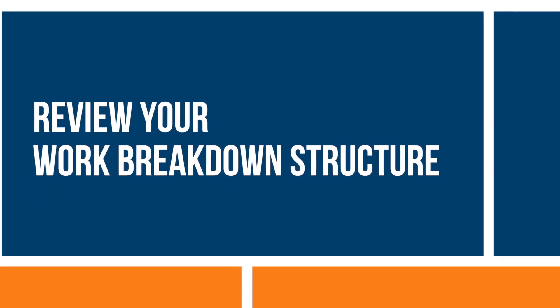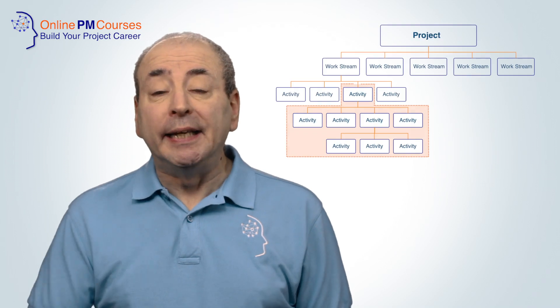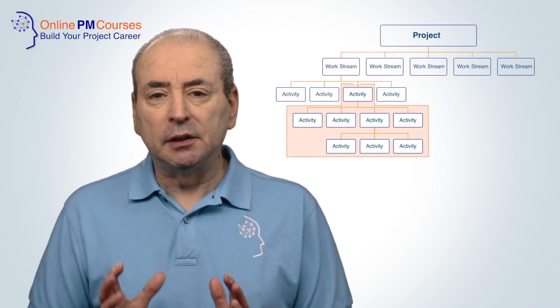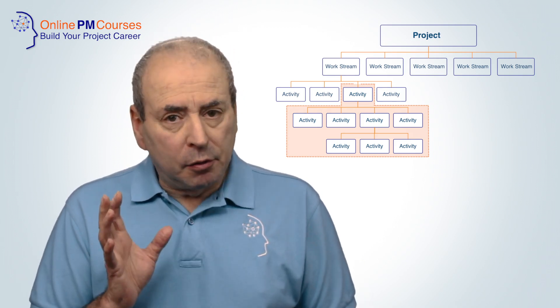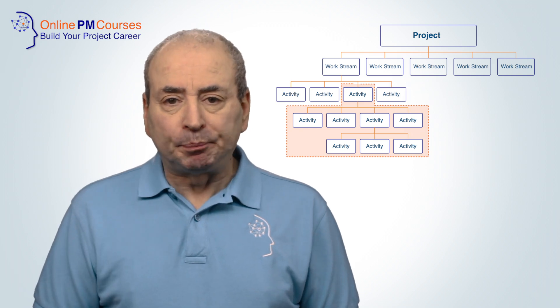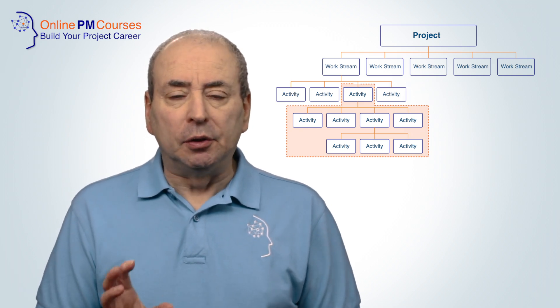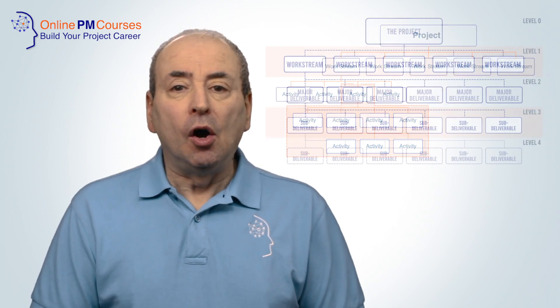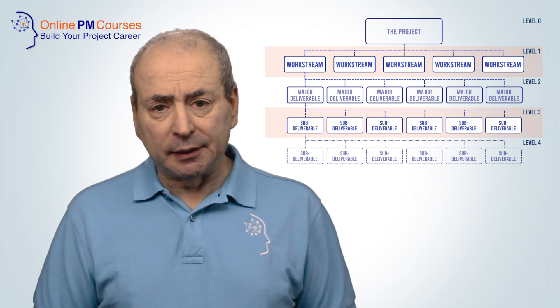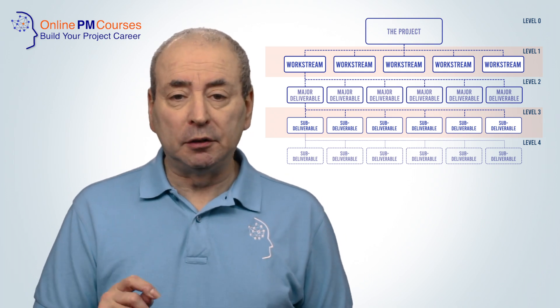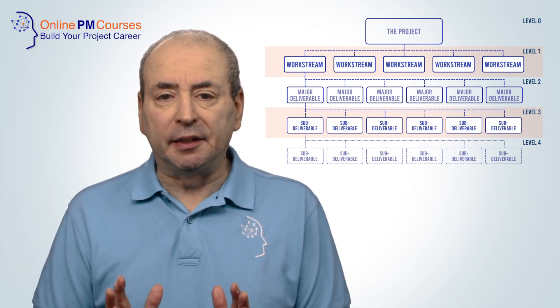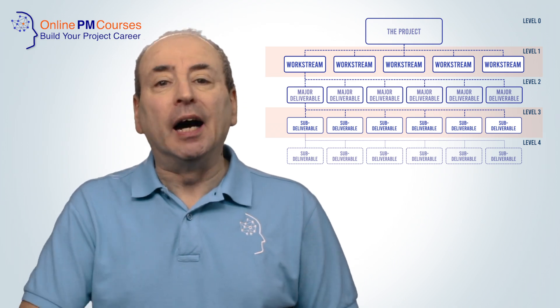Step one: review your work breakdown structure. First, ensure that it breaks the work all the way down into individual tasks. Review each work package within the work breakdown structure and look to see that it breaks the work down into small enough activities or tasks to create your network diagram. Each task needs to contribute to the production of a deliverable or a product, or to be a facilitator in that process. Critically, each task needs to be something that the person or people doing the task will recognise as a single thing that they completely understand.